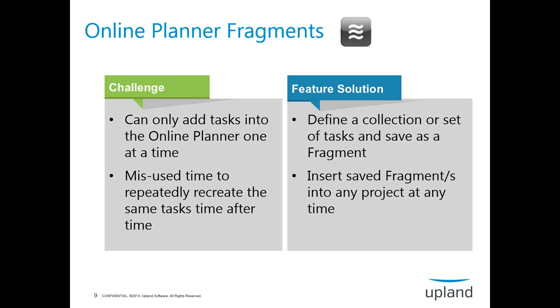Looking at the challenges here, previous to the spring release through EPM Live's online planner, project managers could only add tasks into the plan one task at a time. For instances where project managers would typically do the same types of tasks across numerous projects, they'd have to spend time recreating the same tasks in multiple instances. Fragments address this by allowing the project manager to define a set of tasks and then save them as a fragment. They can then insert those fragments into any project at any time. Let's take a look.